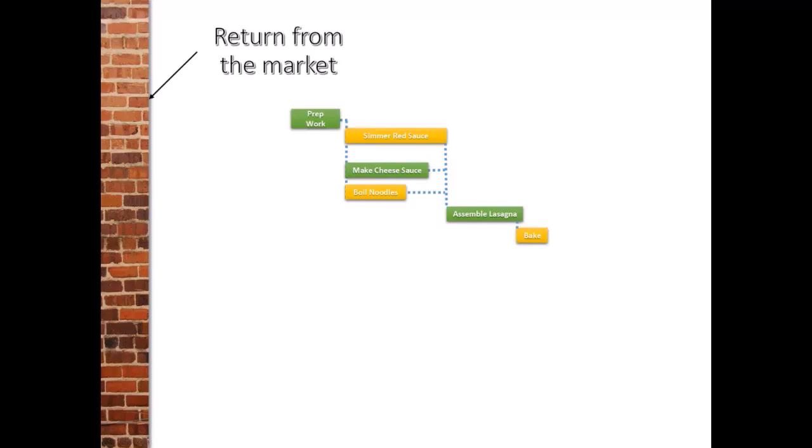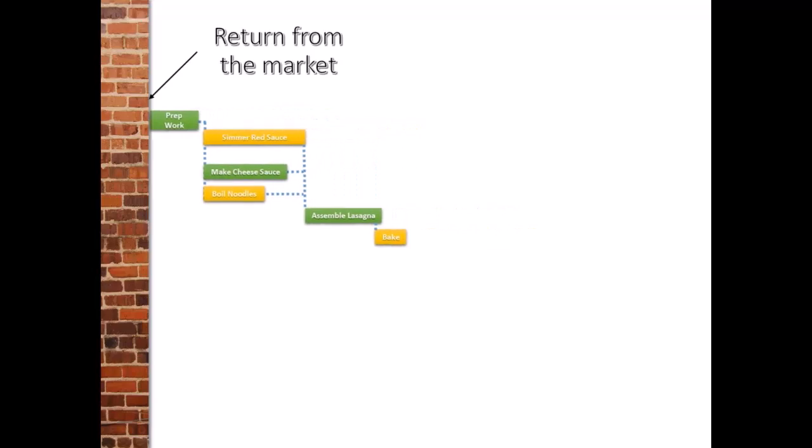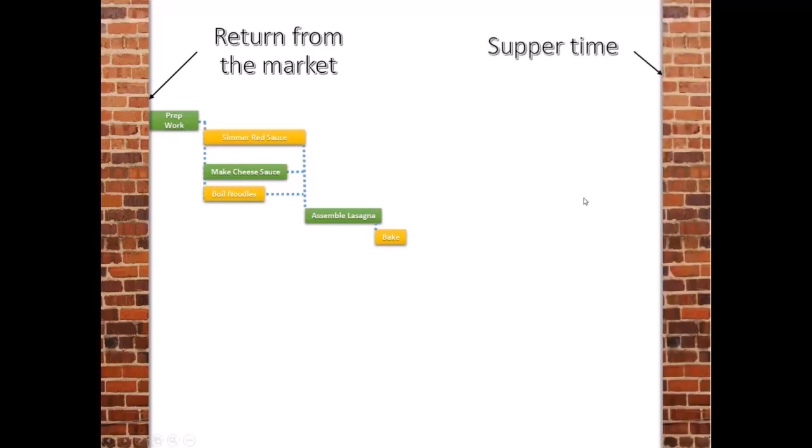So let's take this generic schedule and slide it to the left. Now this is an early schedule because it illustrates in time. Remember, time is going from left to right. This is the earliest that these things can happen, assuming that all these activities take as long as we've said that they're going to take, which typically they don't, but we'll talk about that a little bit later. We're just giving our best estimate at this point in the game. And by the way, the return from the market, I would equate to DOT land as the notice to proceed for the design consultant or the designer.